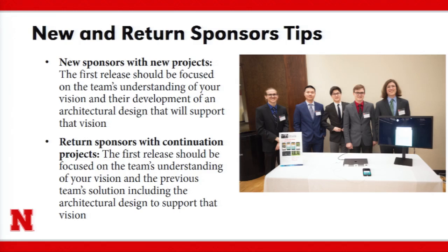I encourage you in that first release to make a decision on that architectural design so that it can get solid, or at least slushy. It doesn't have to be frozen, but slushy, so that this team can move along. I have over 26 teams under my belt that I've managed, and I tell you, the ones that didn't decide on that architectural design early on or hemmed and hawed on it may not have been as successful as they could have been. That's my tip.